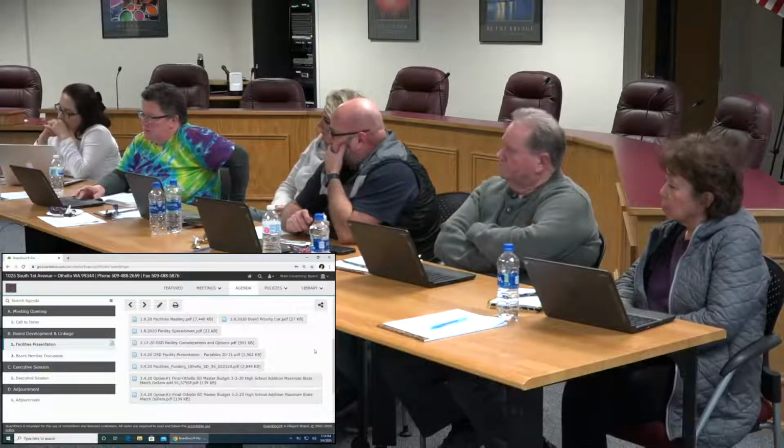Sure. Things are driven big with us, Dax. It's all about the options that you wanna put in. What you'd wanna do is maximize the high school eligibility and phase the projects, because you end up in a cash flow situation where that would be optimal. If you had a $50 million bond, you could front fund the high school, so then you could bid it.